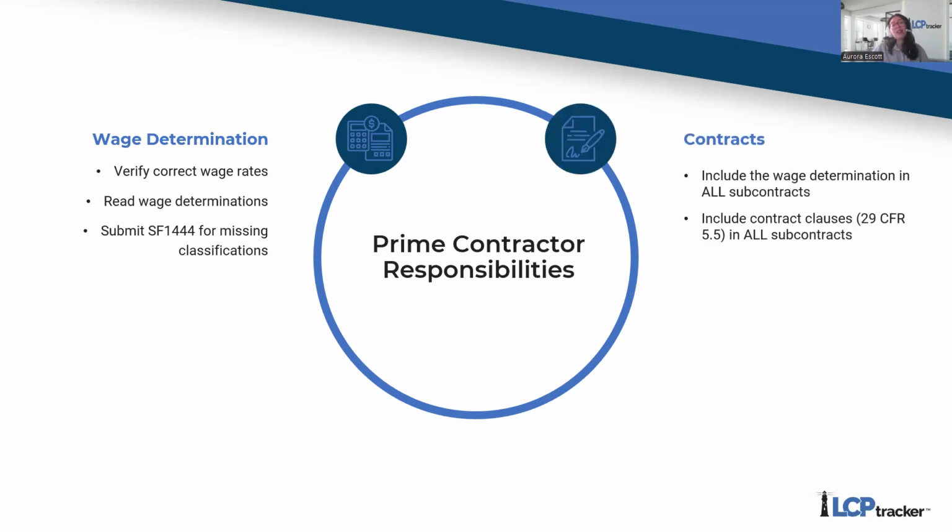As far as contracts go, you also need to make sure that you are putting the wage determination itself in all of your subcontracts. Like, I'm not talking about just yours. You also need to make sure that any of your subcontractors' subcontracts are also including the wage determination.